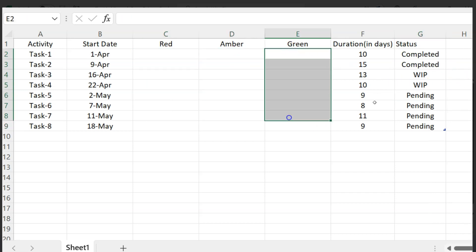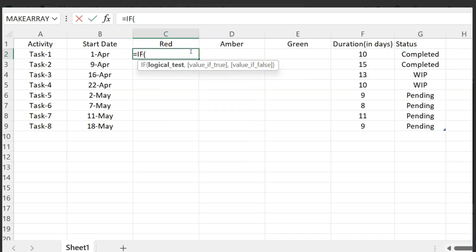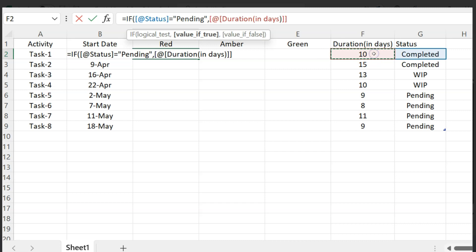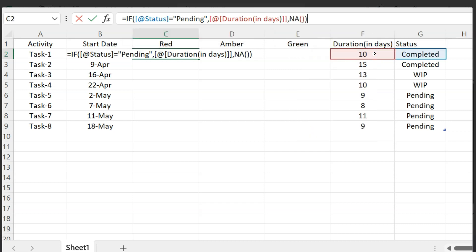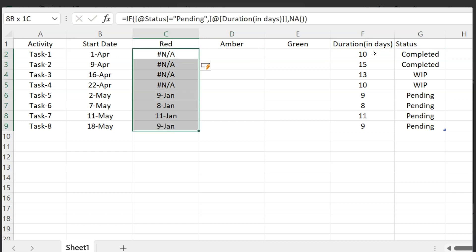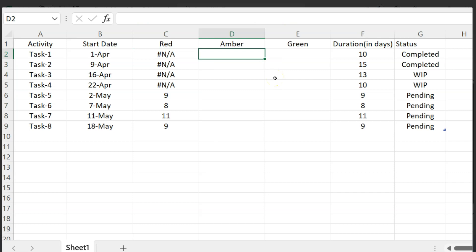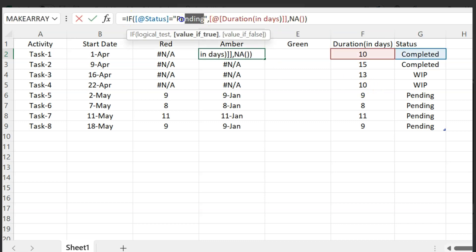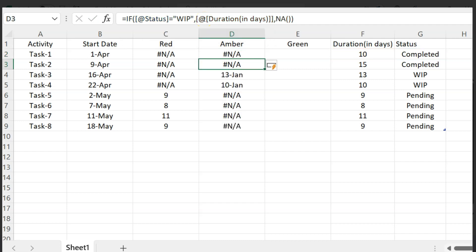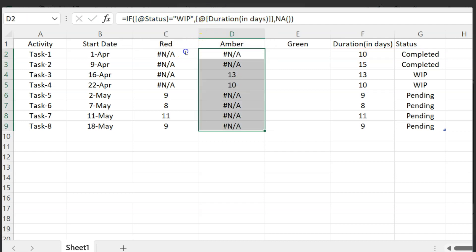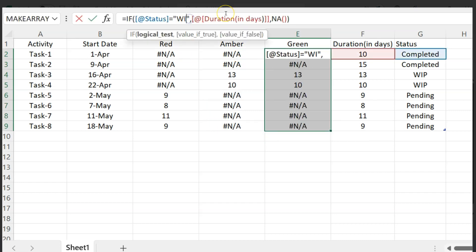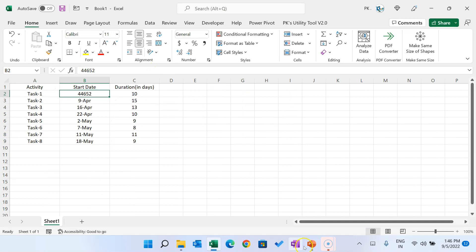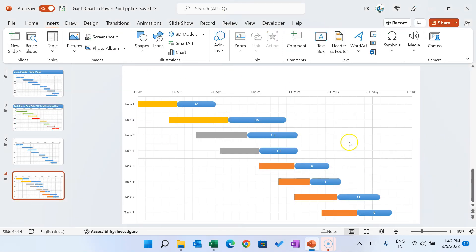Now add formulas for each color column. For the Red column, use an IF formula: if the Status equals 'Pending', show the Duration value, otherwise show zero. For Amber, use the same formula but check for 'WIP'. For Green, check for 'Completed'. Copy and paste formulas for all rows. Change the number format as needed. Close Excel and return to PowerPoint.